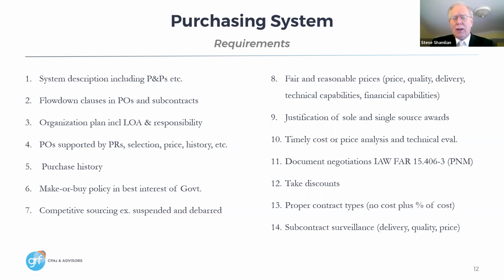And you should know that the government is going to do a P&M on your negotiations, and they will use it in post-negotiation defective pricing audits. You should do your own P&M of that negotiation, and you should do P&Ms of your negotiations with your subcontractors.